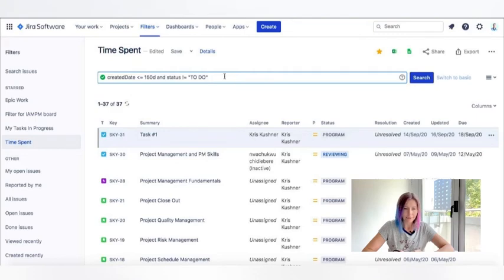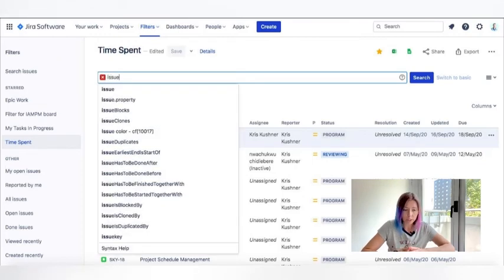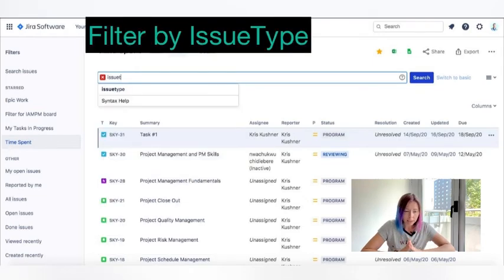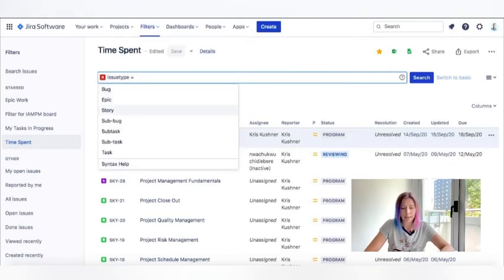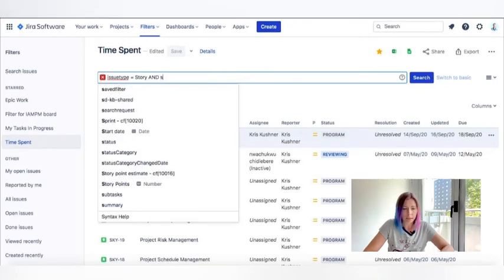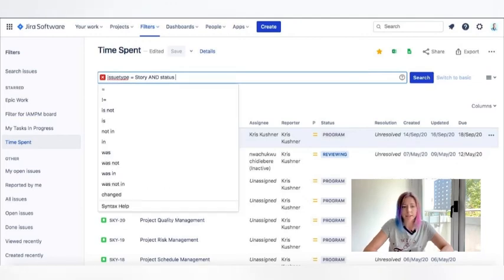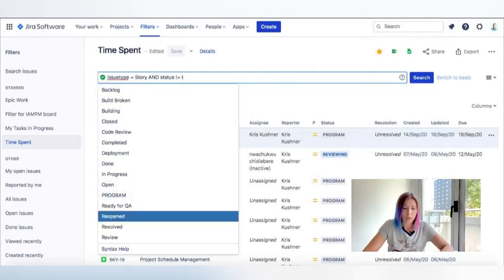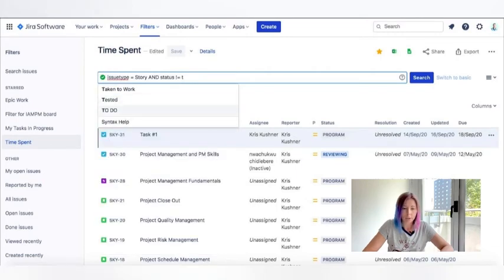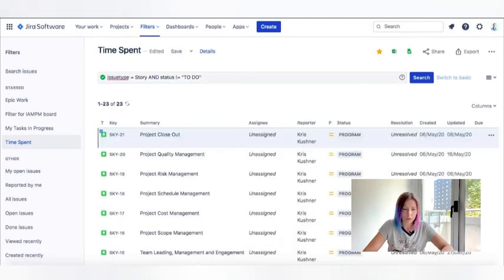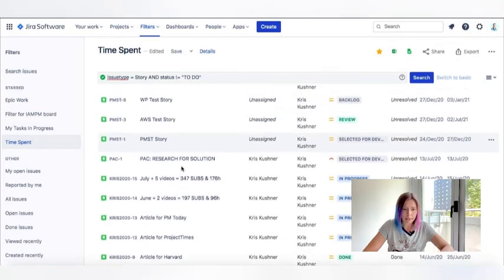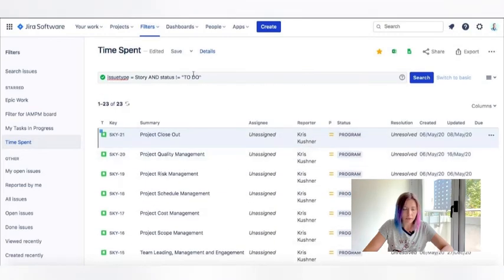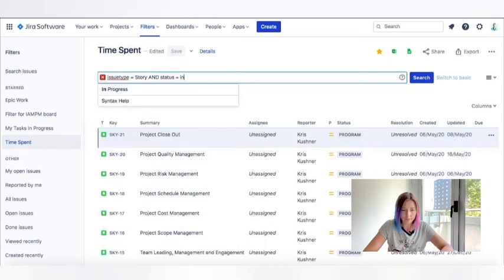And the fifth filter that I use on a regular basis and that helps me keep track of action and track the performance on my projects is the search by the issue type. So what I'm talking about is that Jira provides us with the opportunity to create tasks in different types. They call them issues. And these types of issues help us determine the hierarchy and visually see the work breakdown structure within our task tracking tool. So here I'm trying to find the tasks that are stories and that are currently in progress. Let's save it as well.